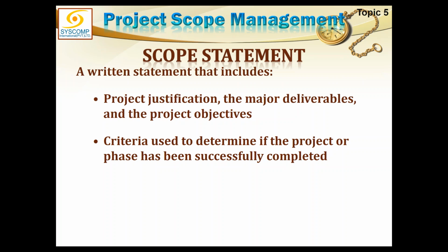So I don't say that he will not entertain any constraint which was given to him in the charter or the earlier documents. He will entertain those constraints, but at the same time, if some constraint is no more, or he can come up with some new constraints, he will have to provide them, so this document can be approved by the project sponsor, and ultimately the project manager will be allowed to plan further. So this is a very important point. This is a proper justification from the project manager side, and then it is a commitment. Once he justifies something and it is approved, then it is a commitment by the project manager that I will do it and I can do it, and it can be done also.